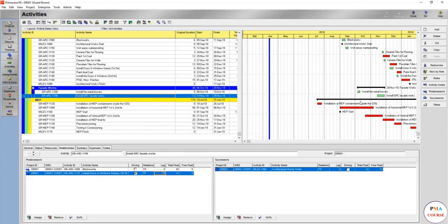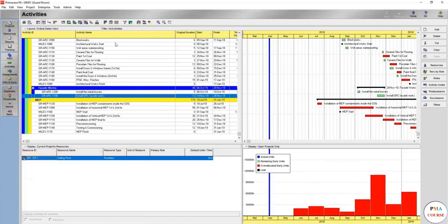So now, as you see, we have moved these two hefty activities into October and November. Let's go to our resource spreadsheet. Let's go to resource usage profile. See, now it looks way better for sure. It goes June, July, August, September, October, November down, then up, which is not very likely, to use September like here and January like here. So most probably we want to increase September.